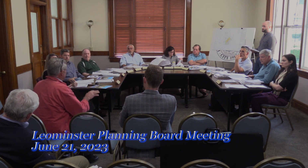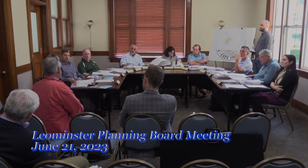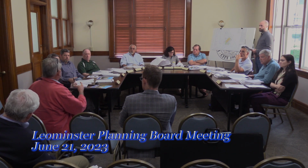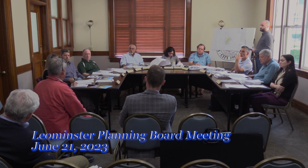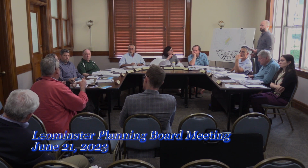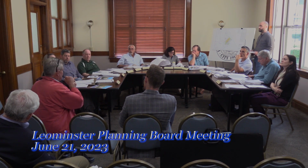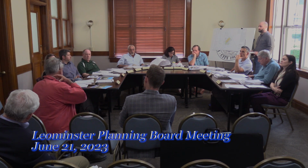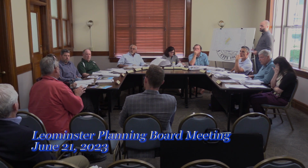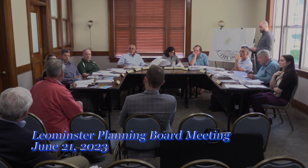I'll be happy to answer all your questions, but we ended up eliminating 9 ranches, 15 units in the front of building 4. So one of the buildings is really just a reconfiguration of units that we're eliminating. We're trying to make it more compatible with the demand. We think this is a better way of doing it. In terms of approvals, we're going to have to go to conservation. We're hoping to get the approval tonight, and then subject to conservation approval, we can't do this unless they do. So we understand that.